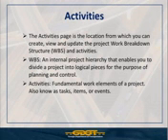The WBS is essentially the internal hierarchy within the project. So whereas the EPS is the hierarchy of how projects are organized within the enterprise, the WBS is how work is organized within any one schedule, right?